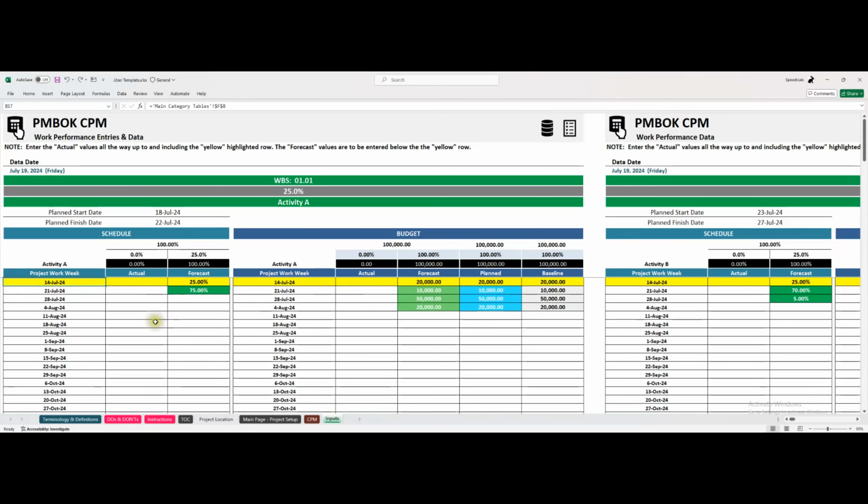We need to take a look at what was actually completed this week, and that's what we put in our actual. Of course, for what was actually done, we can't have a forecast; we can't have both. What was forecasted is in the future, and let's say that we actually got 26% done. So we're 1 over, so this needs to come down by a percentage. You could also do a variation, maybe you have a forecast that's different, but just to show this.